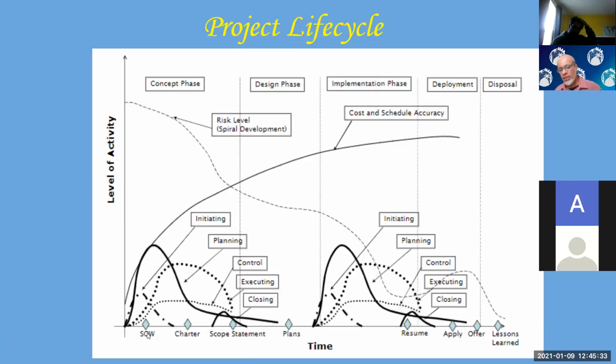Obviously the level of planning that needs to go in needs to be proportional to the cost of the project and the level of risk. If it's a low cost project, it doesn't make sense to spend too much time on the planning. It still has to be the same percentage. So usually the rule of thumb, you might want to take note of this, is 40% of the work on a project is planning work.